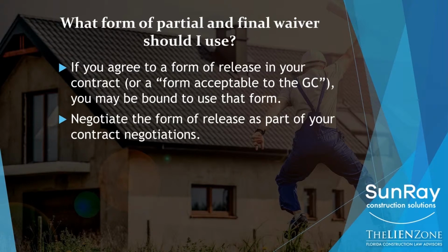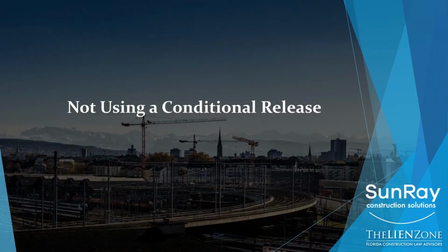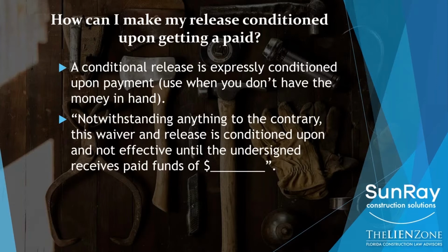Okay, trick number 2, not using a conditional release form when you are giving a release and you don't have a check yet. So let's talk about what a conditional release is. It is a release on any form, but it has a condition, and that express condition is that it is not effective until you receive the payment that's recited in the document.